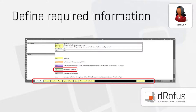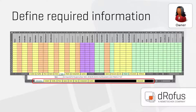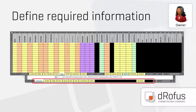Be practical about what you need to know about the building and assets across all the worksheets. There are roughly 50 columns across the worksheets that are green — 'required if specified.' As the building owner, you're the only one who knows if they are needed. Is knowing the shape, color, finish, constituents, or features of an asset type important? If not, don't specify them. This can greatly reduce the stress and improve accuracy if you spend time thinking about what information you really need. It can greatly reduce the cost of capturing data by refining which worksheets and columns are necessary.